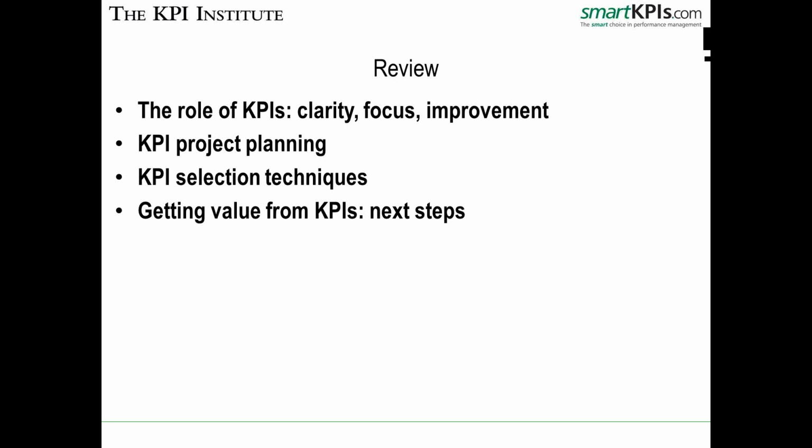The reason why it takes so long is because the preparation phase takes quite a bit, but also the data gathering, the activation of KPIs will take generally about a month. So at the minimum, we can spend 1 month initiating the project, taking care of stakeholder communication, research, KPI selection workshops, documentation, and then another month on gathering the data and reporting.